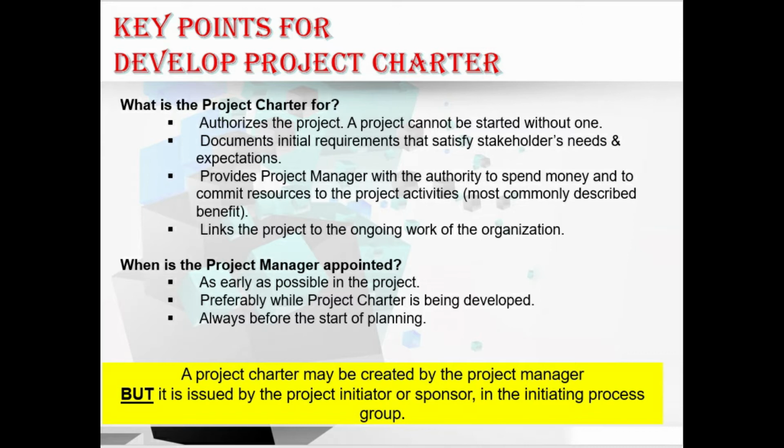What is the project charter for? The project charter first authorizes the project. That is, a project cannot be started without this one. And also, it documents the initial requirements that satisfy the stakeholders' needs and expectations. And also, it provides the project manager with the authority to spend the money and to commit the resources to the project activities. And also, a project charter links the project to the ongoing work of the organization. Okay, hope you understood now what the project charter is for.